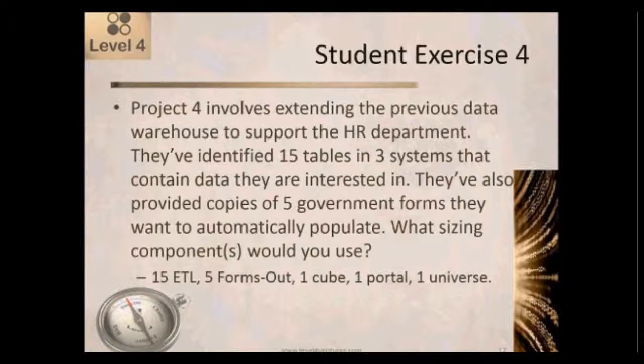If you think about it, when you've got your environmental settings and so on, the amount of experience someone has with the code base they're working with, the system they're working with, and the data they're working with has a big impact on their productivity. So ideally, when you're doing data warehouse work, you like to have a partnership with the source data owners where each of them will take on responsibility for the extraction component. That gives you the most efficiency possible. And then they'll be able to help guide you as to whether this will be an average, low, or high complexity extraction.